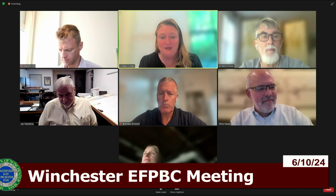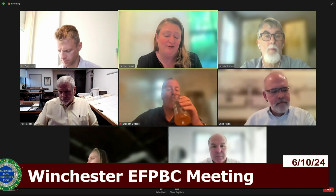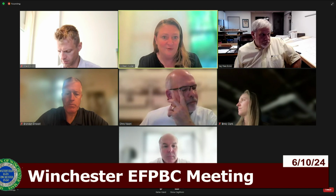I'm not advocating for Enel and Lalek or anyone in particular, but their energy models, in my opinion, are not a science. You make certain predictions and assumptions, and then it's actually being used differently. It is a little bit helpful for Enel and Lalek to be a partner in this because they're a partner on the design side for us. So we're not having a total third party come in and say you're not meeting the EUI targets. I think they would work with us a little bit to figure out where the discrepancies were. Yes, I agree with you, Chris. Generally the reasons the energy modeling predictions are off are either occupancy use or plug-in loads. Folks bring in extra stuff, teachers and whatnot, and those are things unanticipated.